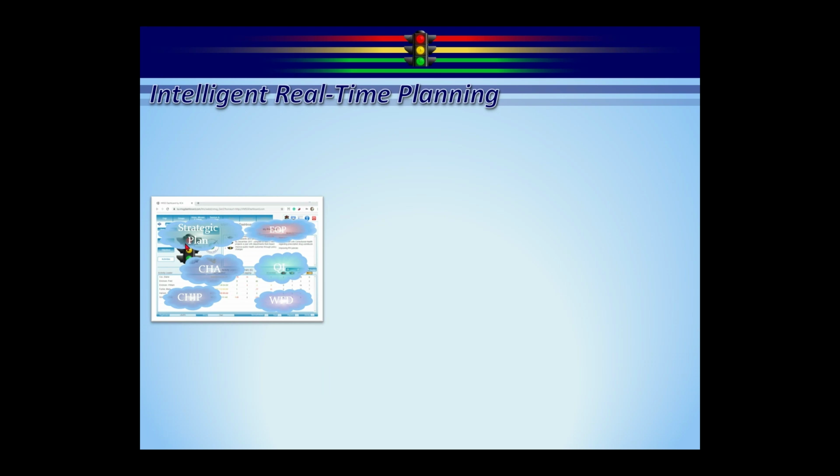So first Monday of the month at 1 a.m., the system goes in and looks at everybody who's designated as an objective lead or an activity lead. And it asks 3 questions. Number 1, has this person been in the last 30 days and updated their stuff? Number 2, does this person have anything that has fallen behind schedule? And number 3, does this person have anything that's overdue? So today is past the ending date on the activity and it's not 100% complete.